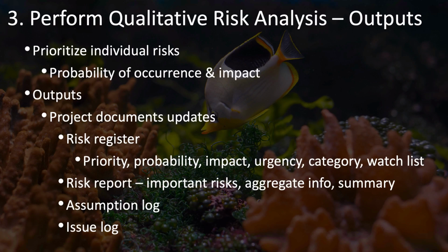The outputs of this process you might think would be a qualitative risk analysis. And although you do this analysis, there isn't really a separate output that's identified in the PMBOK guide. Instead, the results of this analysis are used to update primarily the risk register and the risk report.